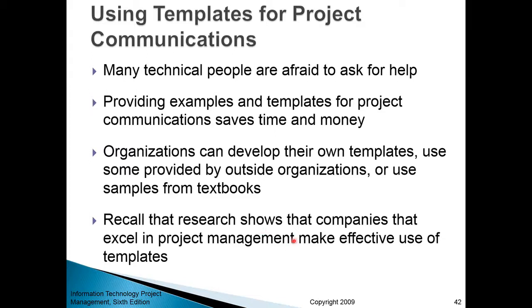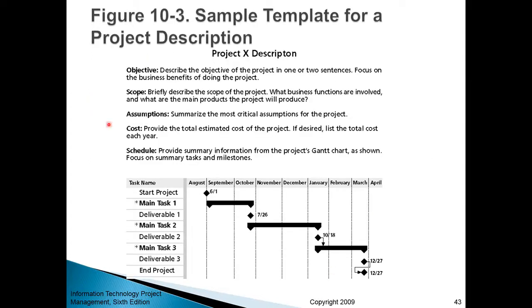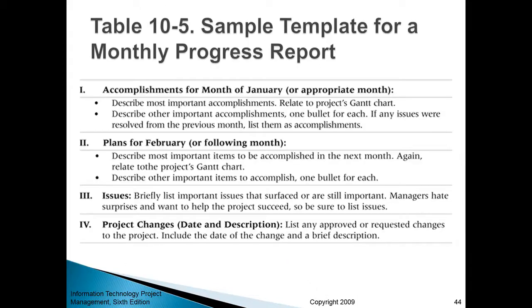Research shows that companies with excellent project management make effective use of templates. For example, if you want to pitch a project and have it discussed during a committee meeting, you might use a template that includes main objective, scope, assumptions, cost, and schedule in the form of a Gantt chart. Here we have a template for a monthly progress report — you can pause and look at some of the parts you may include.